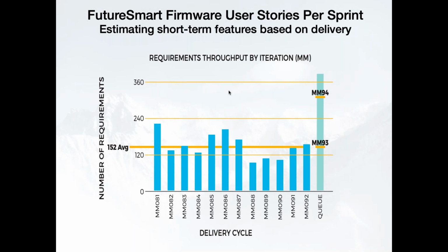And what tends to happen is, when you get so focused on accuracy of plan, you tend to invest more and more in planning. And by the way, business side, I need you to sign off in blood on the requirements that it's never going to change. And then I need to commit to this long range plan, and I get this whole dynamic of confrontation between the two groups. Then I don't take advantage of the flexibility software provides, and I don't get the two groups working together on flow. By making this change at HP, we got the business and the development teams working together, optimized on flow. And we delivered every month on a monthly cadence.